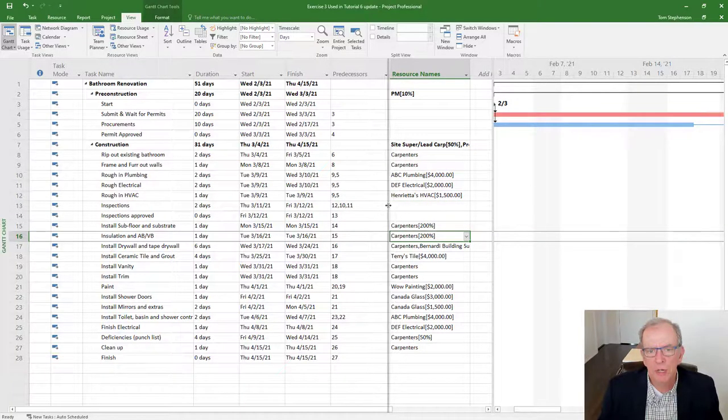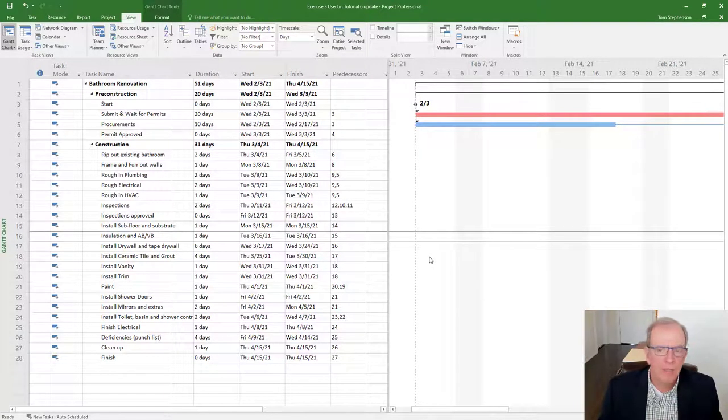We've got some subcontractors and costs that we've applied throughout the project as well. So we're now at the stage where we want to update the project. The first thing you have to know is you need to set the baseline. If you've structured a project like this, this is your plan, you've added all your costs, this is what you want, you're ready to go. So then you need to set the baseline. Setting the baseline is, in essence, saving the plan, and then we're going to measure how we're doing against the plan as we go forward. We're going to see, are we ahead of schedule? Are we behind schedule? Are we over budget or under budget? But we have to set that baseline.